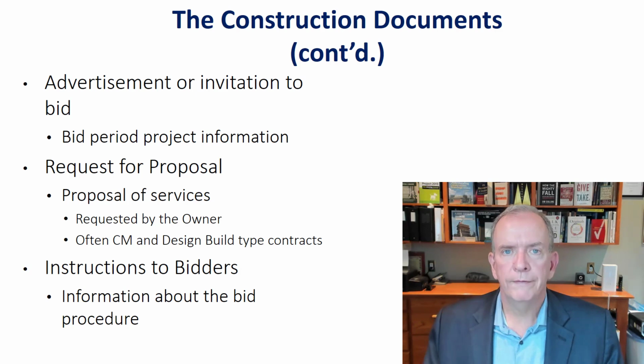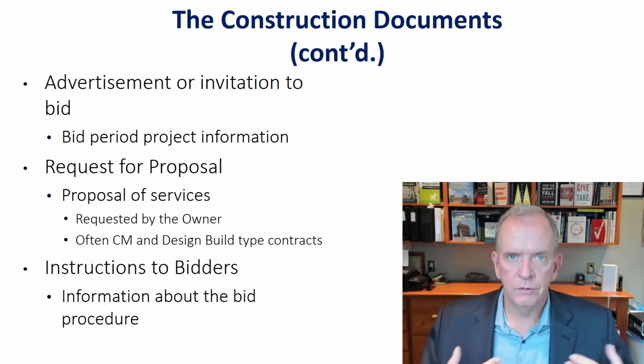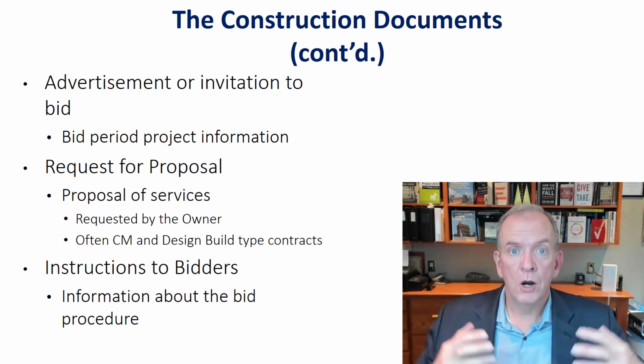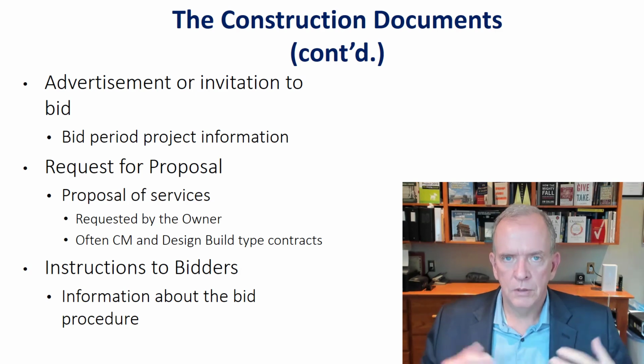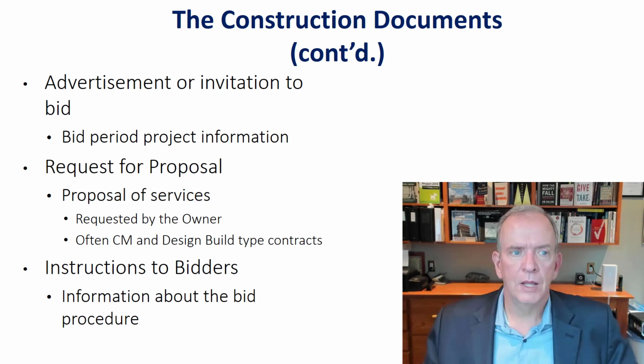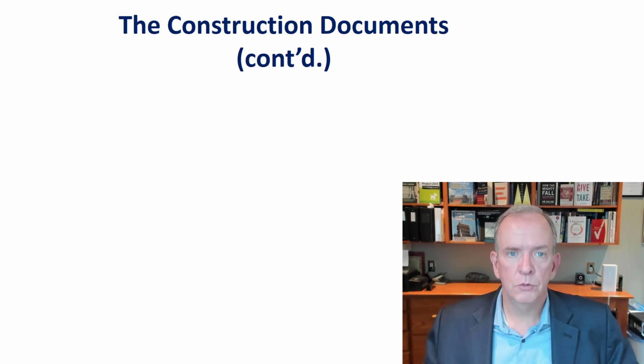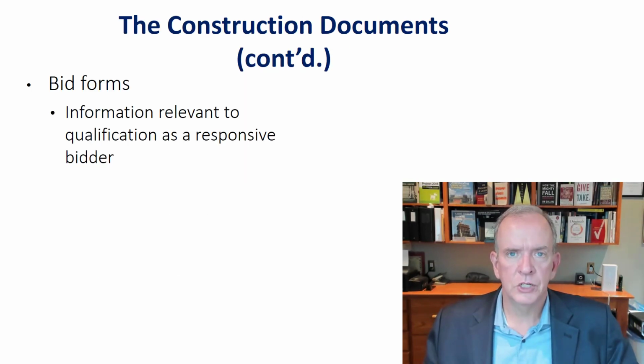There may be pre-qualification information that you have to fill out to ensure that you can actually bid on this project. And the pre-qualification information is trying to establish, are you capable of doing this work, right? So have you done hospitals before? Have you done this type of work? How busy are you? What's your financial standing right now? So these are the types of questions and documents that fall out of trying to procure the work, and they become part and parcel of the construction documents.